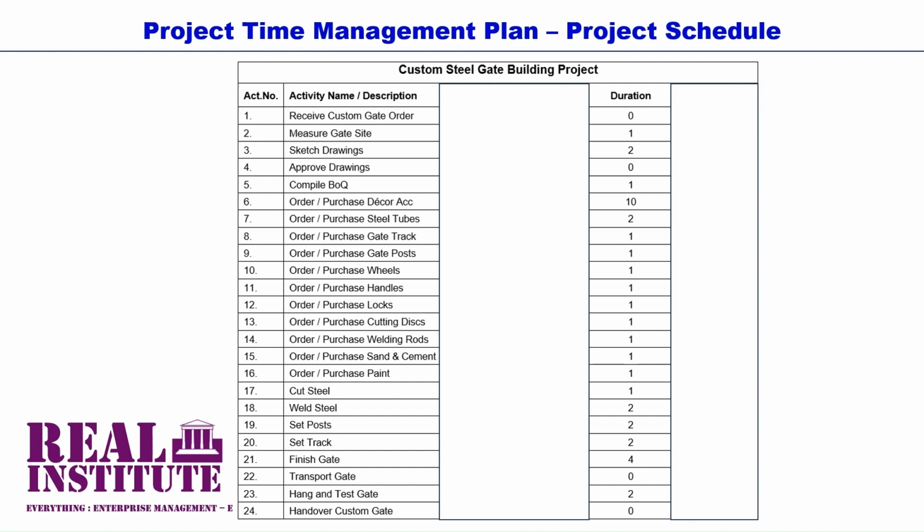Therefore, on the aspect of project time and project duration, it is incumbent on the project manager to be as efficient as practically possible in planning project time relative to how the project will perform regarding time and resources. If the individual project activities' durations were underestimated during planning, then the project manager will be caught by project activities that get delayed or complete later than scheduled, resulting in the project being late or behind schedule. The project sponsor or the project owner or the customer or the client will frown at this.